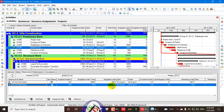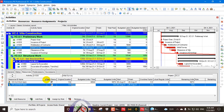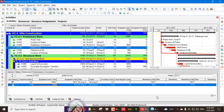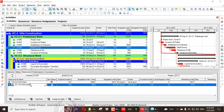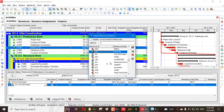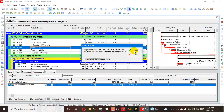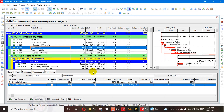Here the budget is 125 units. We can change the budget units per time to 65. If we change that, the hour time factor is 2.0. We add another resource — Electrical Work Team — and say yes we want to use their new resource unit per time factor. It will add the same, the duration will be the same, and the budget units will be impacted accordingly.